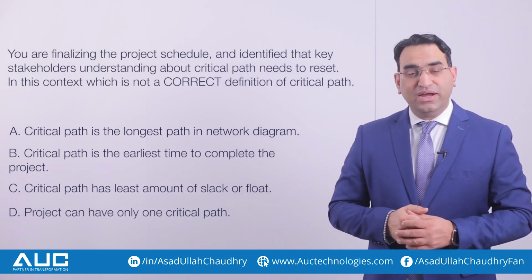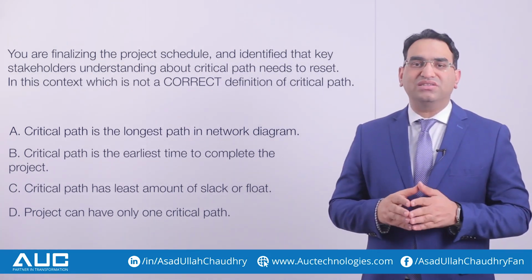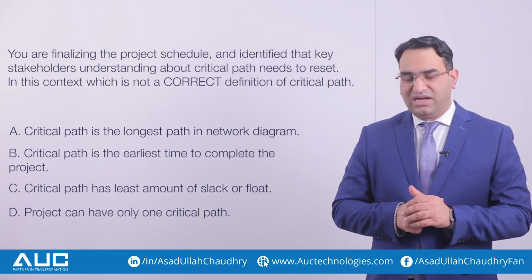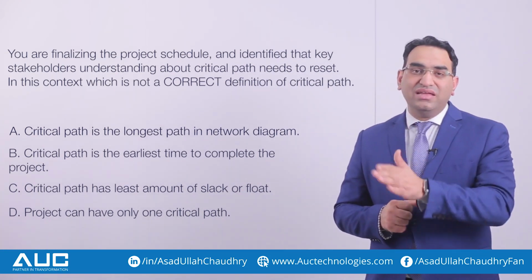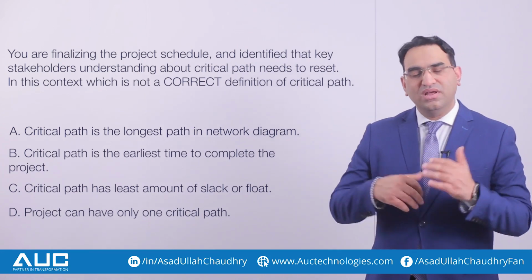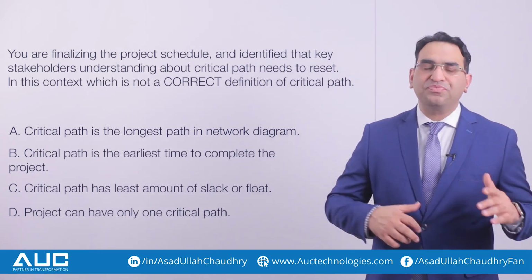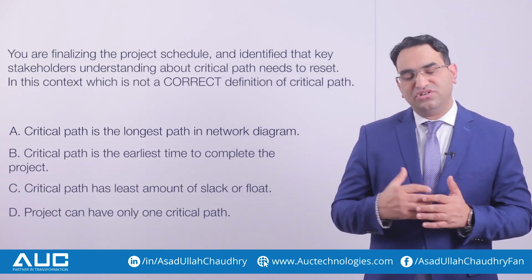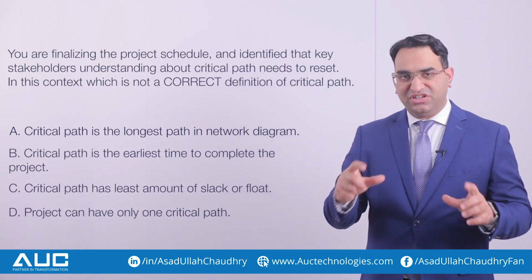Yes, this is true, and when I talk to people, they know about this and they say yes, critical path is the longest path in network diagram. Then the other option is critical path is the earliest time to complete the project. Some know this, but they have a different connotation. Basically, I would say they are both one set of the definition.